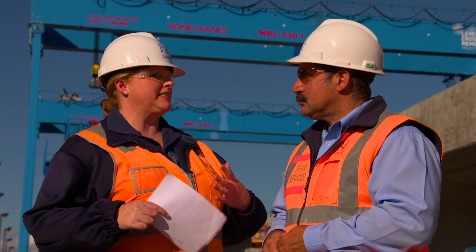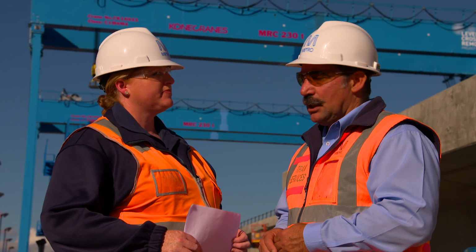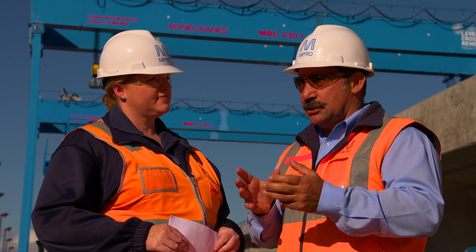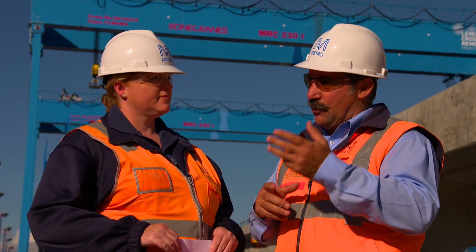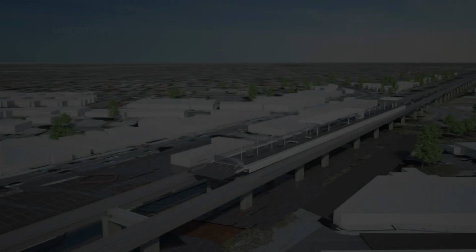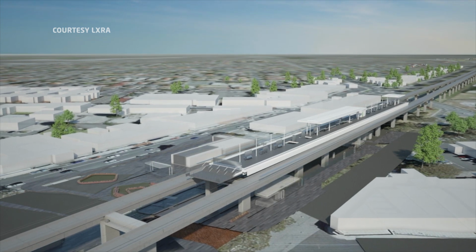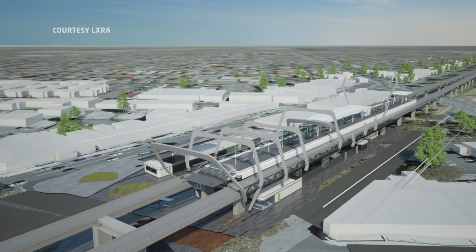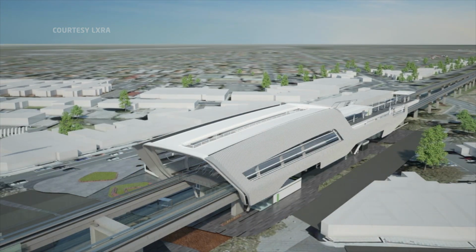When are we actually going to be seeing the straddle carrier operating? So we're looking at having the straddle carrier operating around about July, and we're going to have some station closures which will impact us a little bit. Station closures of Carnegie, we're looking at August, and also later on we're looking at Hughesdale being shut down and demolished. Okay, and where will the new Hughesdale station be placed? Well, that'll be part of the new elevated rail, and that'll be between mid to late 2018.